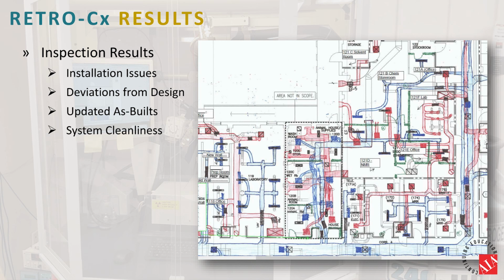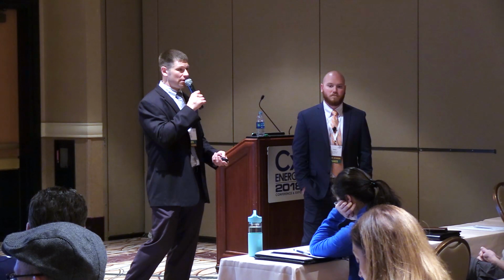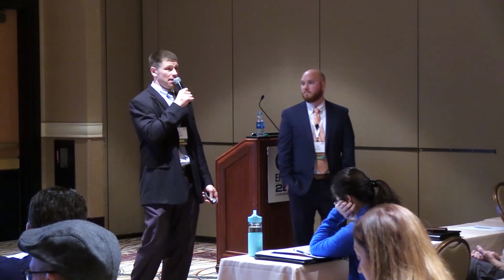Like Travis said, one of the first things that we do when we get into the facility is our investigation. We start walking around and looking for things and seeing how things are laid out. Well, we have to do that because we've got 25 different renovations in a building, and we've got to pull these things together and figure out what is actually installed. Where's our ductwork routed? Where's it coming from? What's serving what? And so as we're doing that walk-through investigation, we're popping tiles, looking at the layout of everything, and we're drawing it, and we're marking up the as-builts.